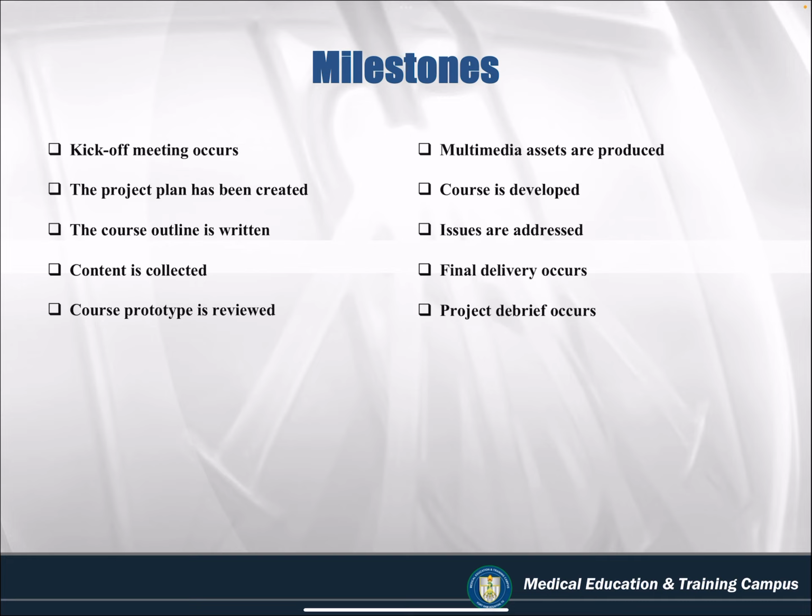And lastly, project debrief occurs. After the project completion, the project team will conduct a debrief with leadership and 2 to 4 ISSs attending the training to gather input and use as needed for improvements or changes.